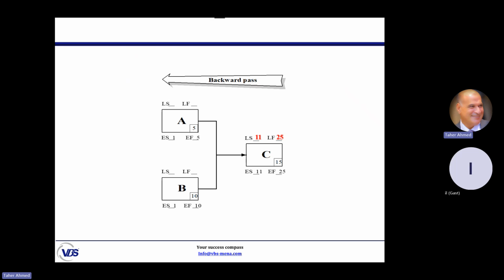It means the late finish of the previous activity will be the day before the late start of C. Which is the previous day of 11?